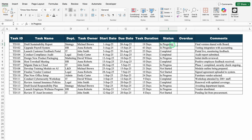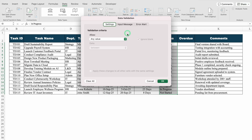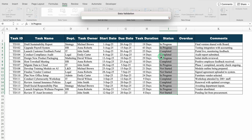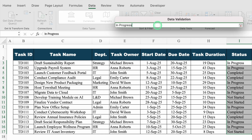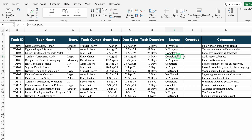For the Status column, in case you want to create a drop-down, it can be done very easily. I will select from top to bottom, go to the Data tab on top, come to the center to Data Tools, and select Data Validation. On top we can see three things: Settings, Input Message, and Error Alert. In Settings, under Allow, I will click the drop-down and select List. For Source, I will type: in progress, comma, completed, comma, not started. I will click OK, and our drop-down list got created.